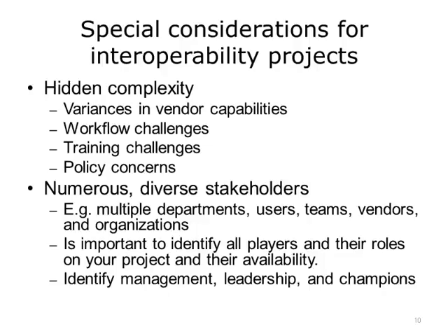The team working on interoperability projects often does not follow typical departmental boundaries. For lab orders and results interoperability implementation, it might include clinician representation, EHR/IT representation for the physician practice, EHR vendor representation, laboratory clinical staff, laboratory IT representation, laboratory information system vendor representation, and interface engine representation. It is very important to identify all the players and their roles, especially project management and leadership. Because there could be many stakeholders, leadership must be clear.